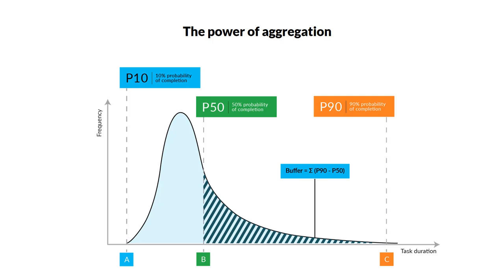TOC, with its counterintuitive thinking, goes the other way, understanding that if we collect up all the contingency each individual has stashed away for themselves, we can take advantage of the law of large numbers. The whole is better than the sum of its parts.